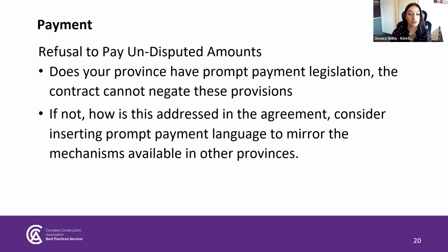So citing the general process from the Construction Act in Ontario, some critical elements to ensuring payment certainty, even with prompt payment legislation, is to establish a date of the proper invoice. The owner then has 28 days to pay from the date of the proper invoice. The GC has 7 days to pay after the owner pays. And it's important to remember, the GC is required to notify regarding non-payment.